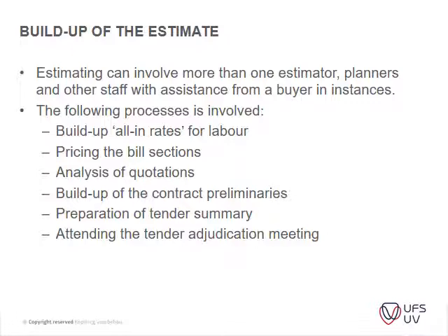Now you need to interpret that information and build up your rates for labor, pricing, and dividing your items that you received into the units for the bills, analyze the quotations, build up your contract preliminaries, and preparation of your tender summary, attending tender adjudication meetings, etc., to get feedback on whether you are in the ballpark with your tender or not, to learn from that.